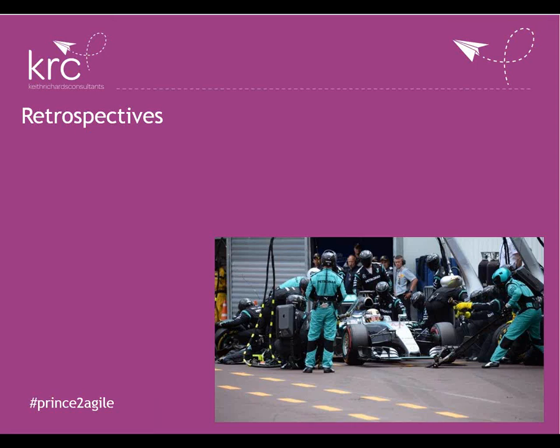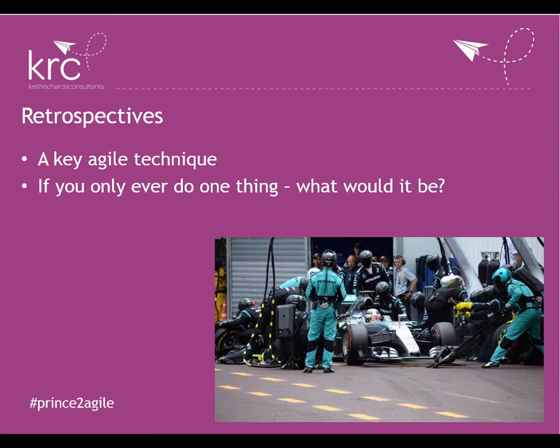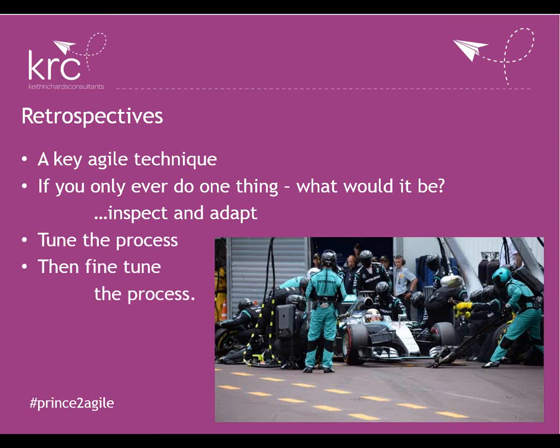But this is where your retrospective comes in as a key Agile technique, and I'm only plugging this one technique in this particular area. But if every couple of weeks you're honing and fine-tuning the process, you're going to be in a much better place. So fine-tune the process, and this is why, if there's one thing you do in Agile, which is one of my biggest concepts that I really like, it is the idea of inspect and adapt.